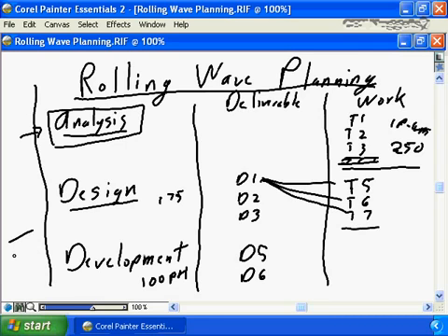But you need to ensure when presenting that total project effort, that 525 number, that you're presenting it in a way that people understand that there's a degree of imprecision, that there's a degree of flexibility in that. When you're presenting the information, you're defining that it's plus or minus a certain percentage, plus or minus 75%. When you're doing rolling wave, it's important that you're presenting the definition that the total project size has been estimated, and you have a certain degree of confidence, potentially not high, because we're simply doing a very high-level cast of what our further out phases are going to be.